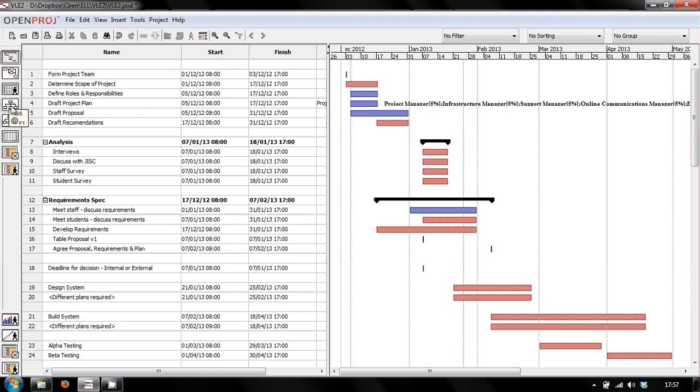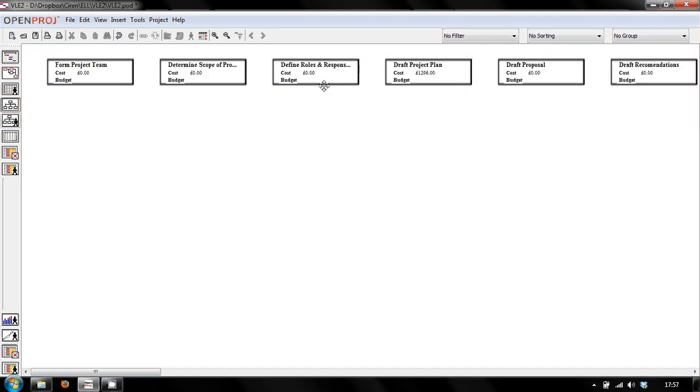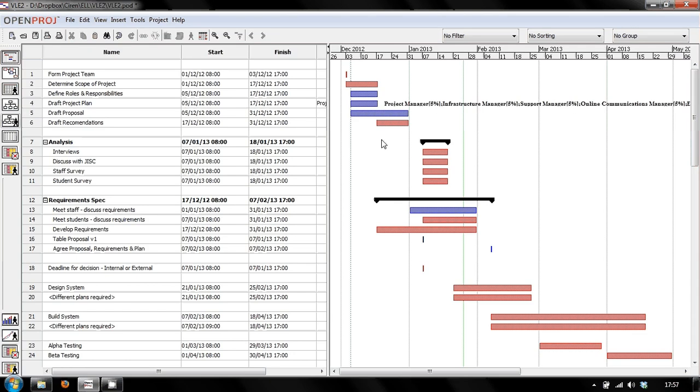Nevertheless, that should now give us a more sensible costing. Yeah, £1,296, which is a little bit more realistic. Though it's obviously still too large, but then I am saying it's going to take almost, how long is that? A week of everyone's time, which actually, £1,200 for a week of professional time of 6 professionals, I think is actually quite reasonable. So yeah, that puts the costing information in.